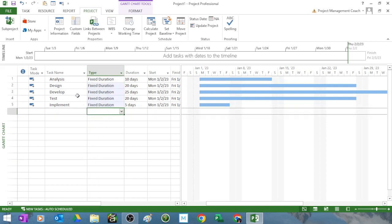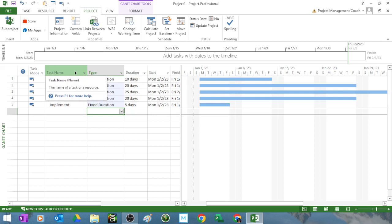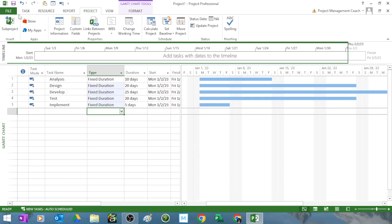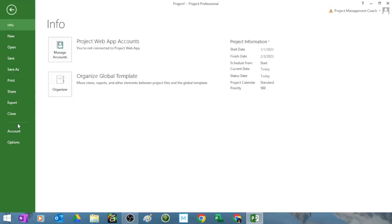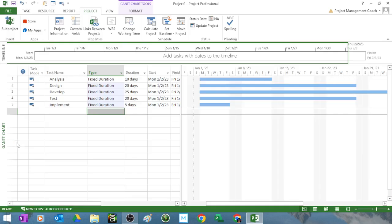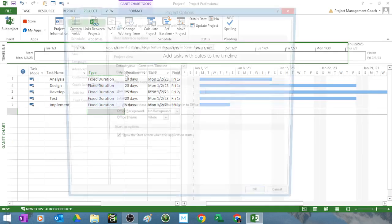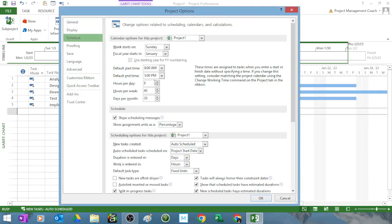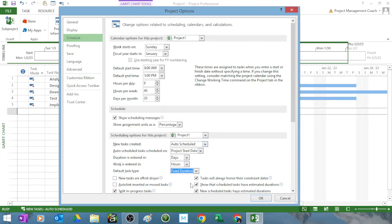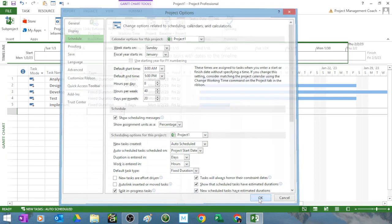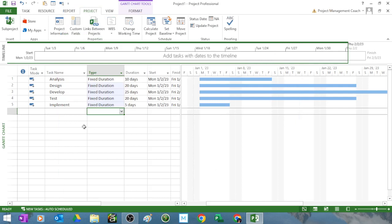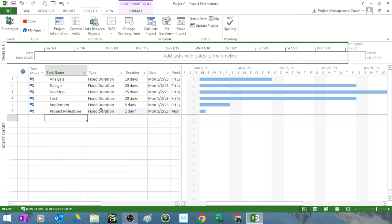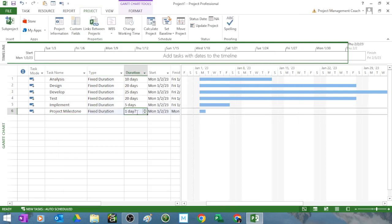Now if you permanently want it to be on fixed duration in this particular file, you got to go to file and you got to go to options, and then in schedule you got to go down and you got to make all the tasks the default of fixed duration. So anytime I put in a task the duration is going to be fixed. It will not move on me.